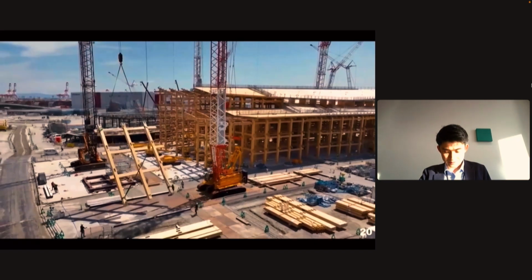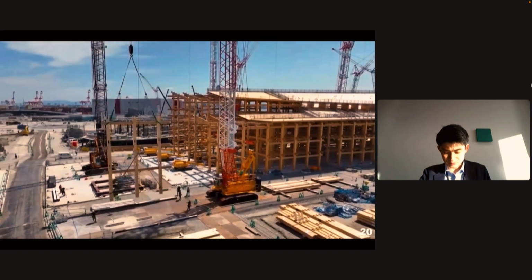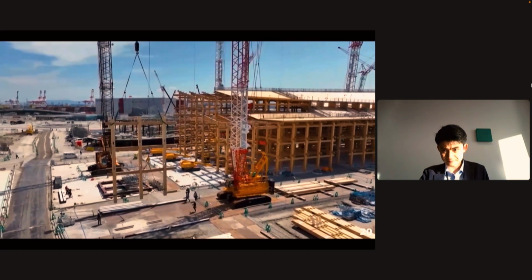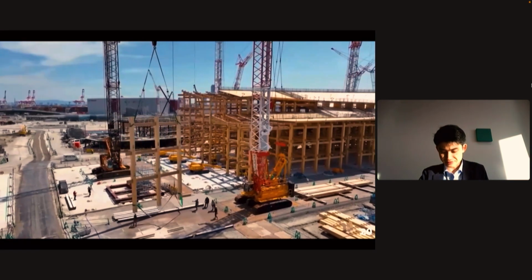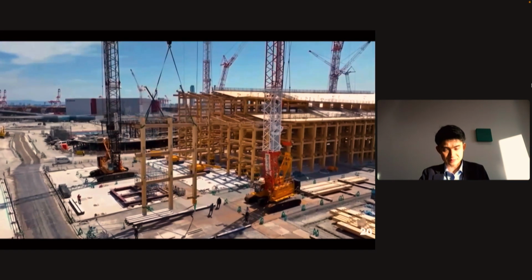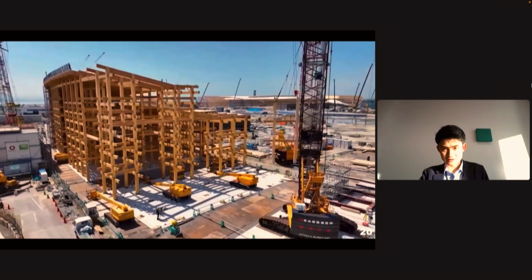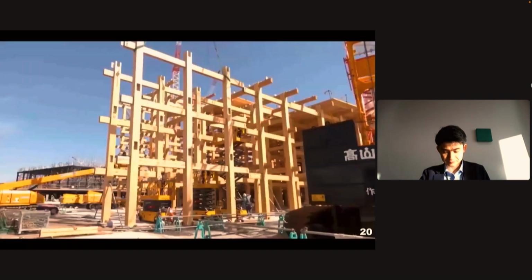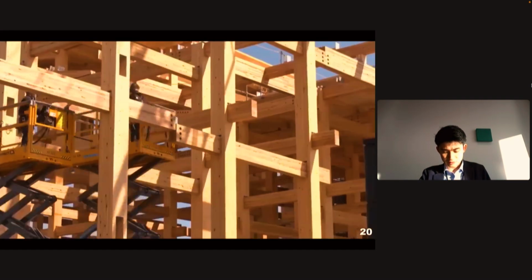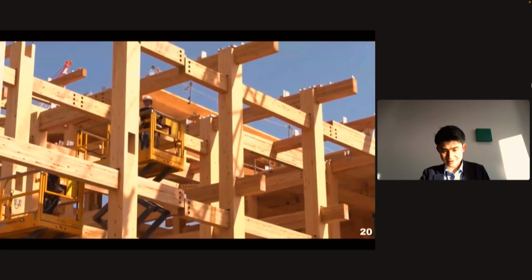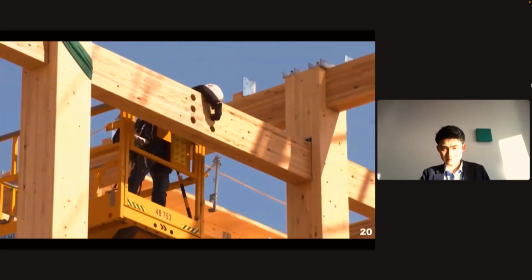We stand the planar units up to form the lower structure. Repetition is the key to boosting productivity. The team improves the speed cycle by cycle, and connects to the existing ring to lock the frame.